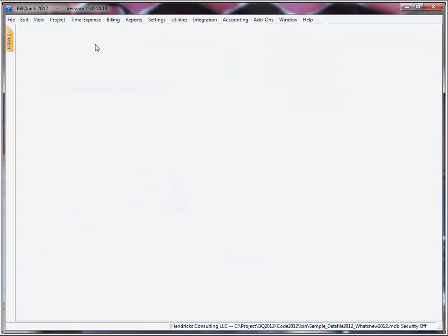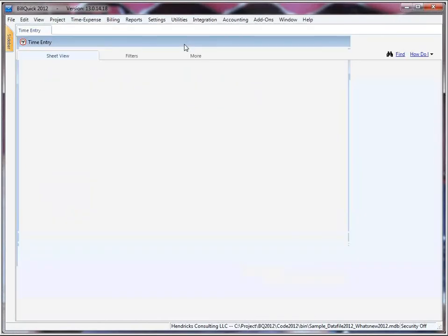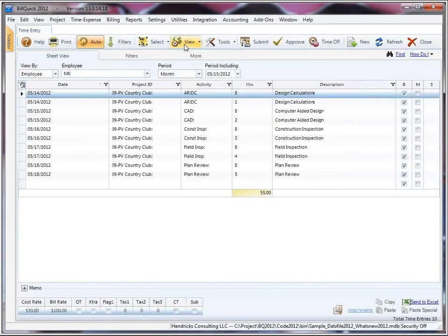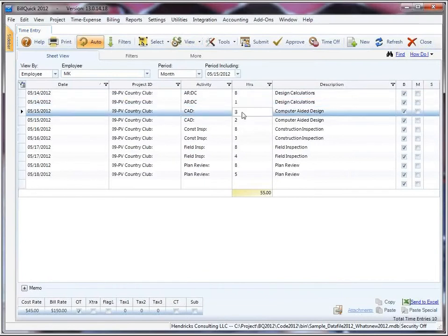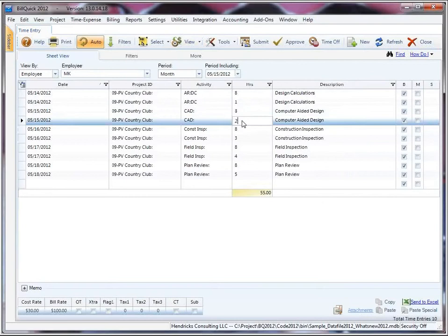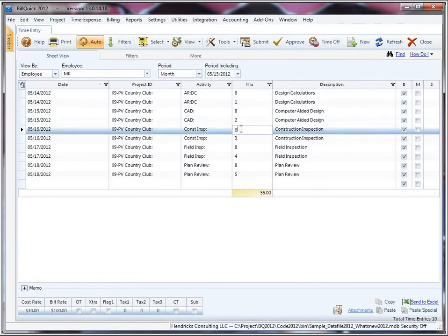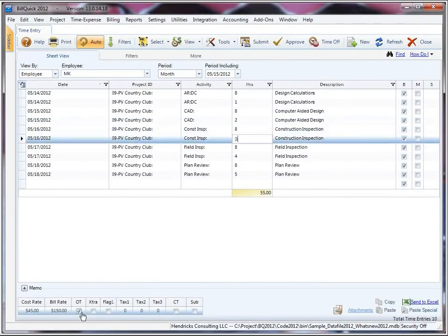And here's the best part. Of course, we didn't just take the regular time and overtime. We, of course, look at all the rules that apply to those specific projects, including your fee schedule. So if you have a fee schedule that you created and you have different rates for regular time and overtime, it will apply those rates accurately based on that fee schedule. So here you can see it split the 8 and 1, 8 and 2, and this one was 11-hour time entry. And notice at the bottom, the 3-hour time entry is marked as overtime.